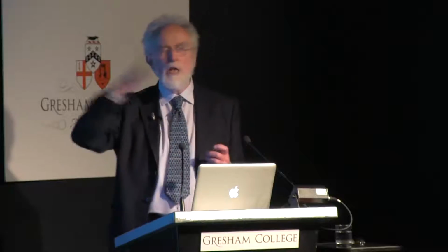The system generated a lot of exceptions. Multiple ambulances were sent to the same call. The exceptions scrolled up off the screens of the operators, and they lost the exception messages before they could actually intervene on the system and correct them. The delays built up. And as delays built up, people who'd put in emergency calls phoned again when the ambulance didn't arrive. And so the call logs, the number of calls coming in, built up as well. And the operators, the control staff, got completely overwhelmed.